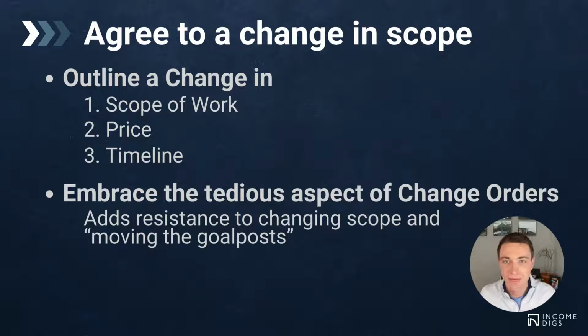What happens if we don't execute change orders, even if price isn't a thing, right? And it's like, hey, why is our project so delayed? Well, we added all this work. Well, if it's not documented, sometimes we forget. Customer might forget about it anyways, but having that documentation, that's really a strong thing to go to the end of a project with and be like, listen, we finished on this schedule with all this extra work that we did, right? Documenting that is really, really important.